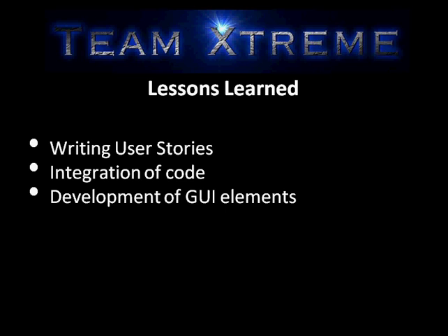Lessons learned number 3, development of GUI elements. In our first iteration, we assigned multiple developers stories that affected the same GUI elements. This was very difficult to merge at the end of each iteration. A proposed resolution would be to assign all the GUI elements in the same iteration to the same developer, or have the GUI elements take place on different iterations.